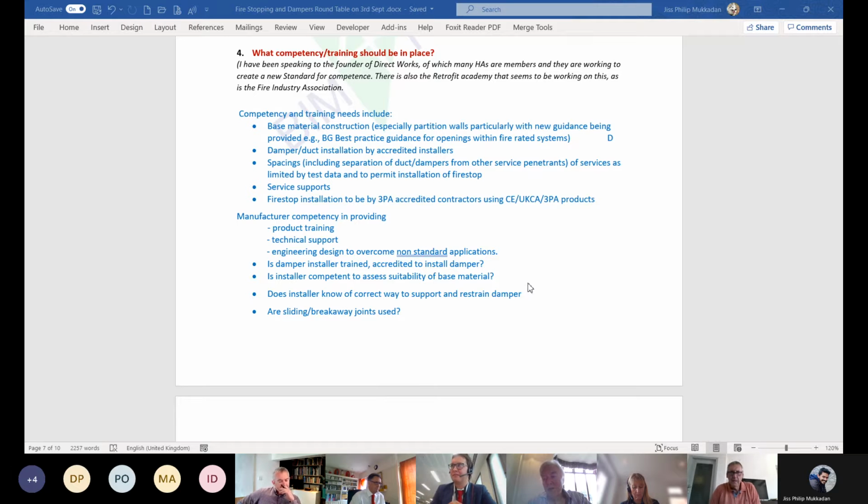You've then got all the information that isn't modeled, which can be delivered as COBie outputs. It doesn't have to be modeled. So on a job, we're just doing a university complex in Dublin at the moment. There are 87 work packages, and there are, I think, 35 BIM models.